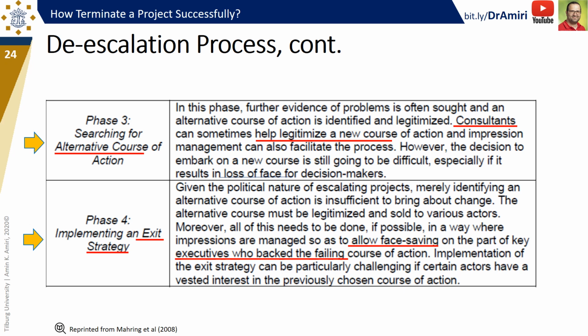The partner company may threaten to file a lawsuit blaming your organization to increase the risk of terminating the project. Here, it is a good idea to hire external consultants to support the termination of the project.